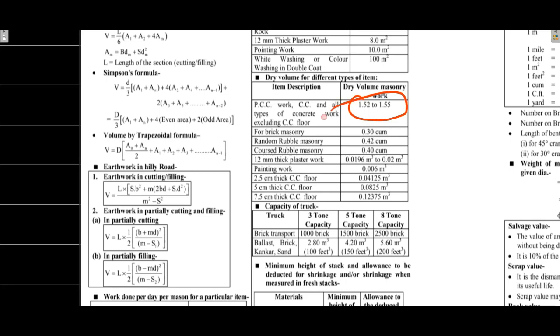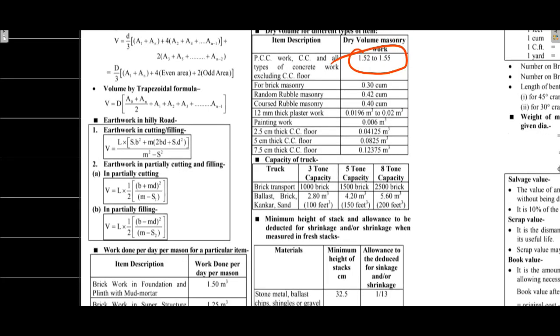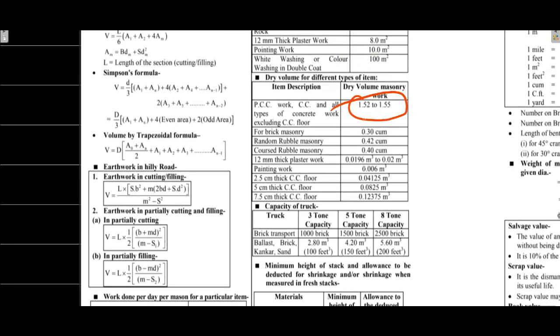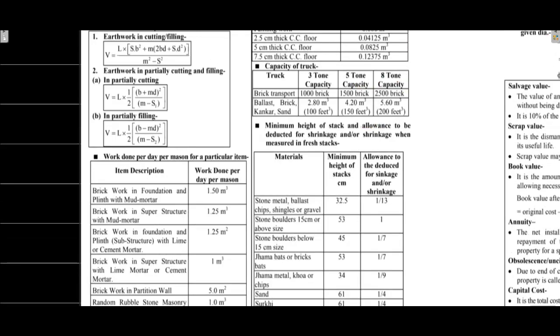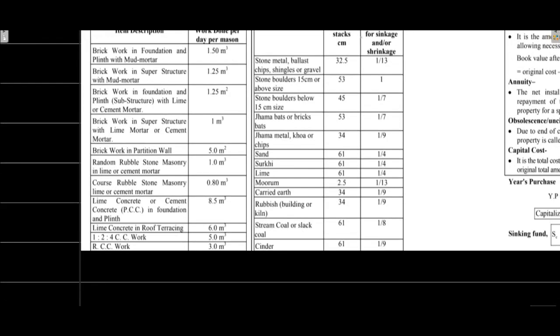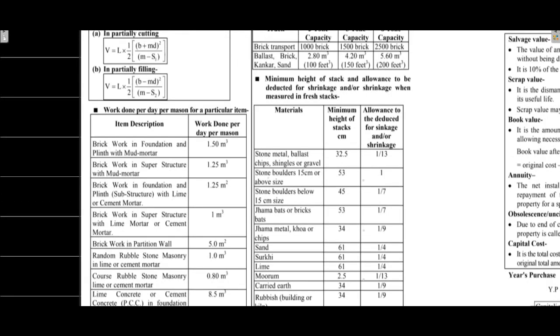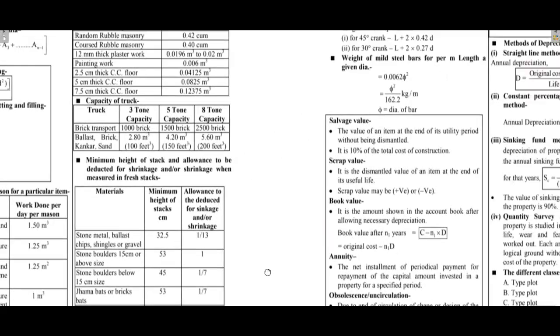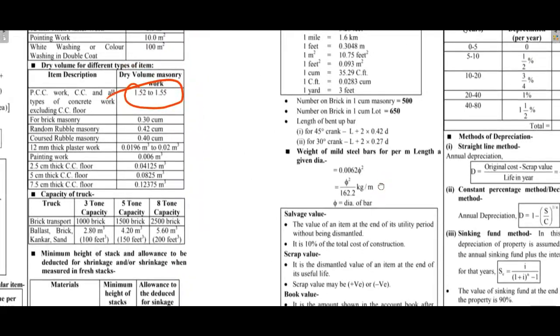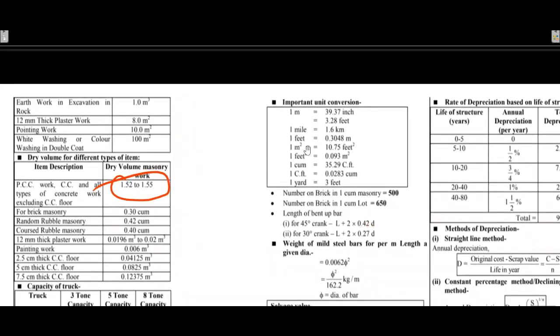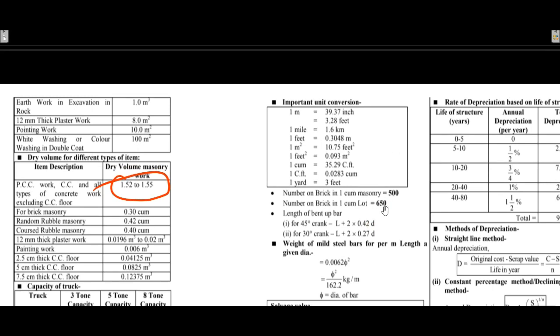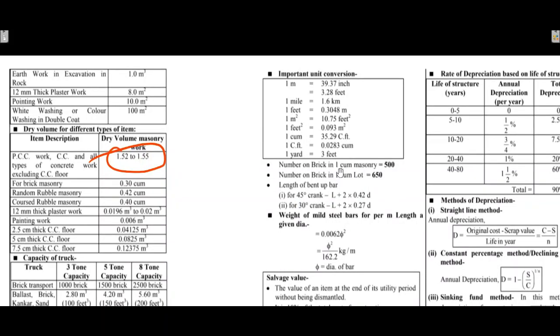For conversion, multiply by 1.52 to 1.55 for dry to wet concrete conversion. 3.1 cubic foot equals 1 cubic meter.